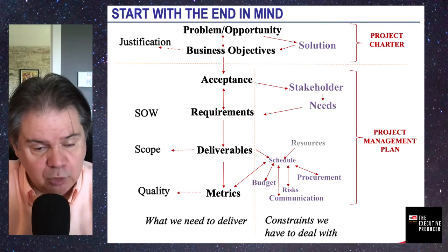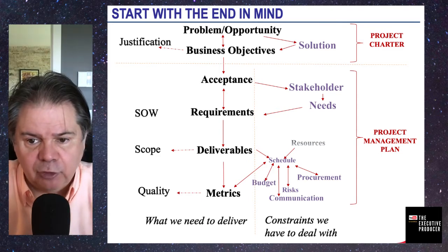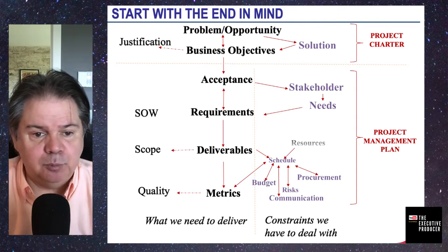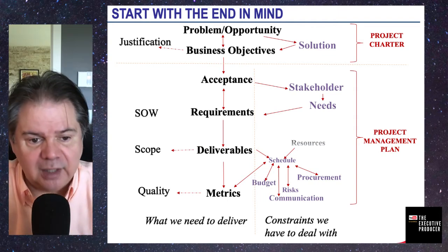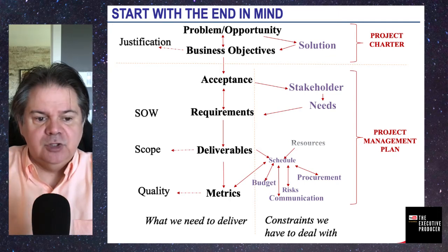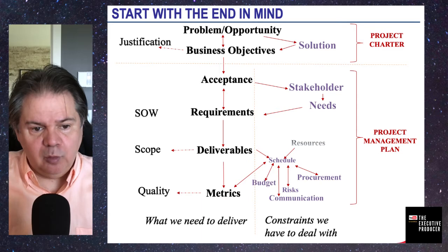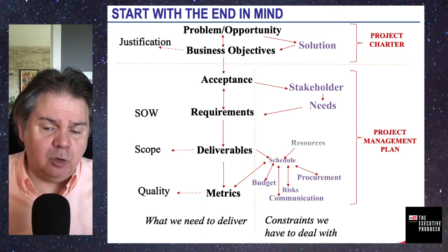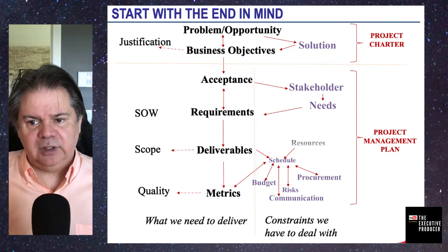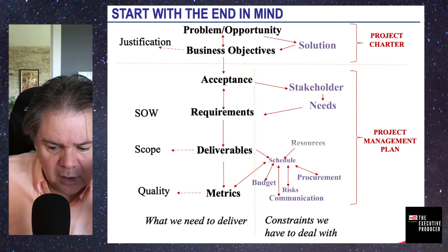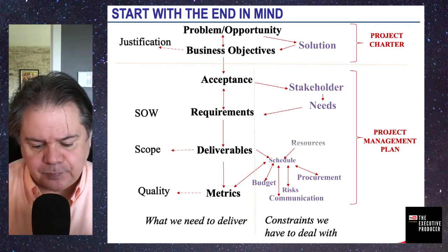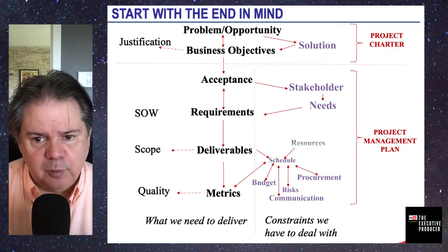Okay? Boom. As soon as you start doing that, whatever critical path you had is changed. And now you need to add to the pool of resources all the resources for quality. Of course, it will affect your budget big time also. So, of course, quality control will be an important piece, but also quality assurance. And people will sometimes have a problem with quality assurance. Quality assurance is really getting confidence. And what do we mean by that, getting confidence? There are certain deliverables, okay?